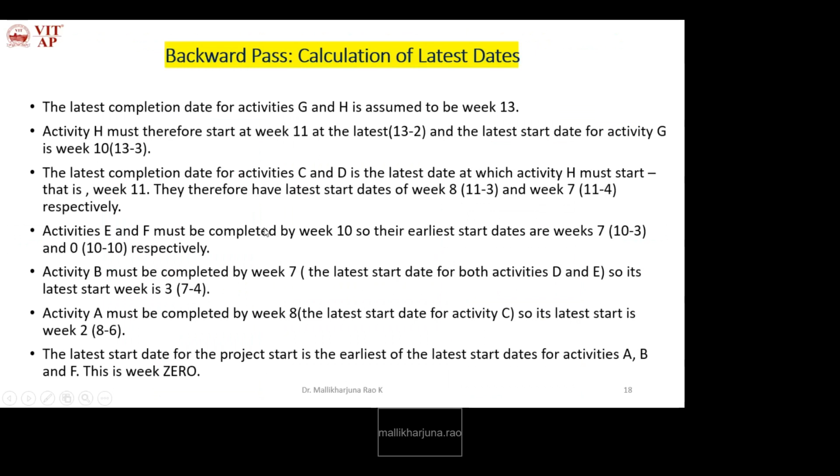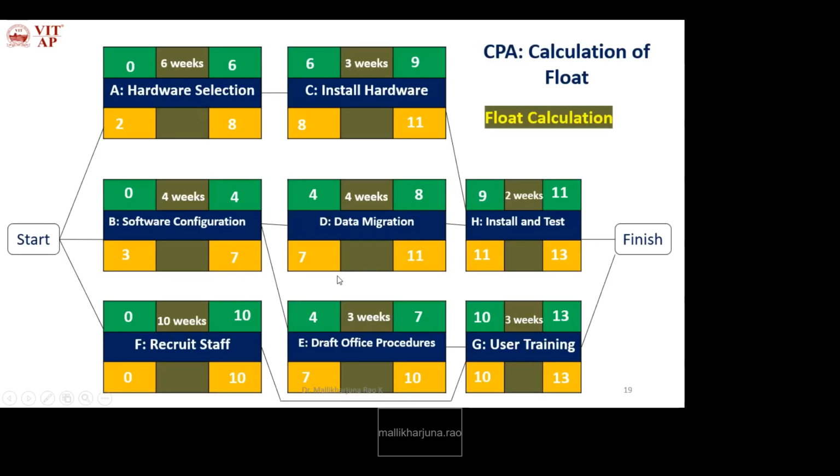Okay, so the steps are represented in this slide. Okay, now we have to calculate float. So how will you calculate float? The difference of either this combination or this. Okay, LS minus ES or LF minus EF.